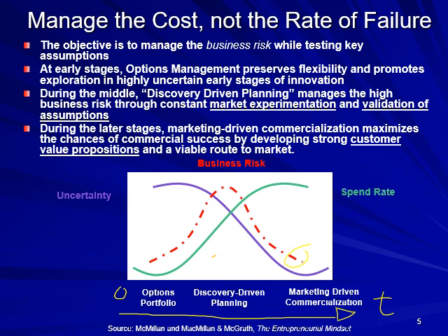So if you have a good idea, you do a little bit of simple testing and you see that it's not going to work, whether because of market factors, technology factors, any reason for it, right? And move on quickly. That's how we learn a lot and how you manage this process. What you don't want to do is just kill a lot of projects after you spend a lot of money. So by the time you're spending large amounts of money, you should be pretty certain that the project is worthwhile. So you're going to take different approaches in how you actually manage this process.